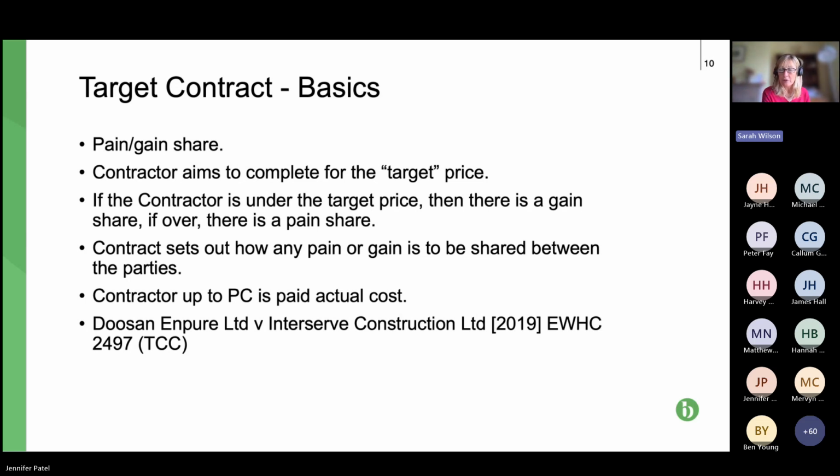So that's the nervousness. The contract, as I've said, is clear, but what we are now seeing as a result of this case, I think, is that paying parties are altering the contract to allow for a pain gain adjustment throughout the contract period.